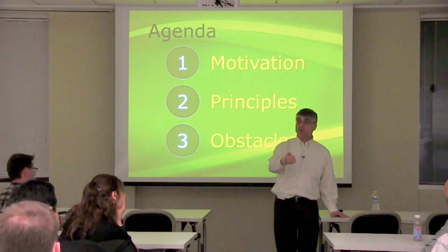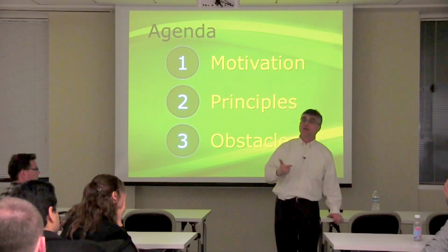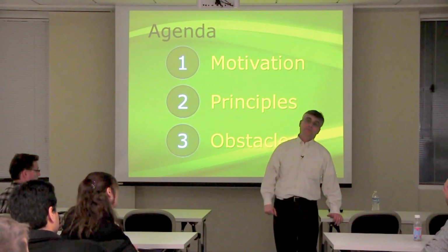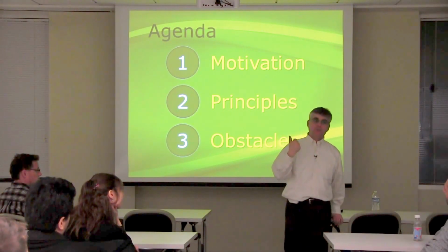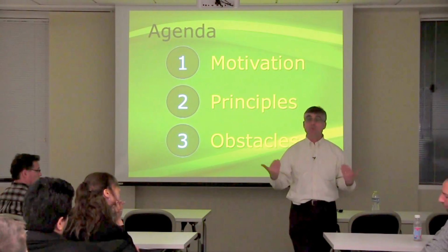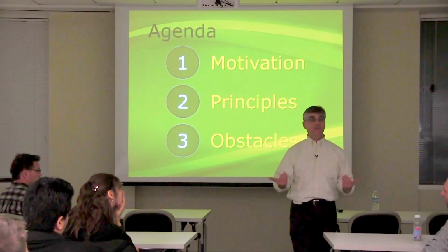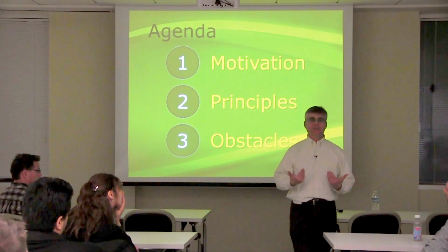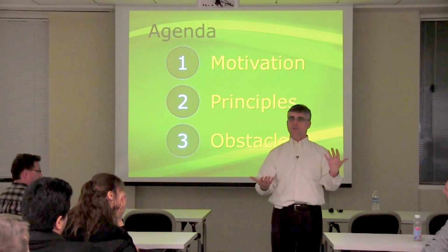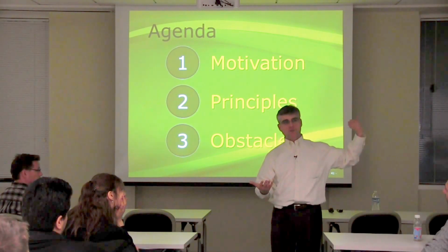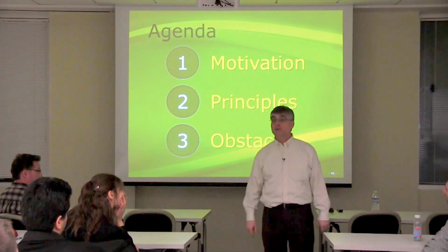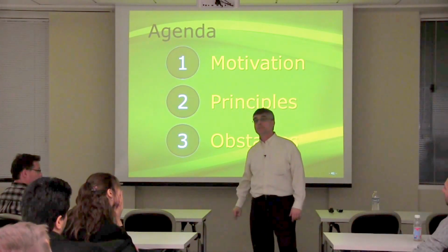So usually what I'll talk to them about is visibility and indirect measures of quality and indirect measures of progress. And so some managers will say, you mean I will get some insight that I've never had before into what's going on? I'll say, yep. You'll have code being written over here and tests written over here. And if your tests are flatline and your code is exploding, then your question mark is just getting bigger.